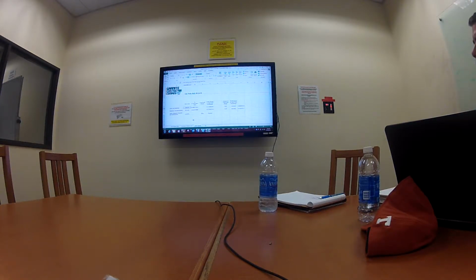So over there, that equals $319,000, right? 35% of the bare cost is $319,000. So then I took that $319,000 and I said, all right, I want to put 2/3 of that to my profit margin, and I want to put 2/3 of that to my labor and equipment, and 1/3 of that to my materials and subs. So I broke it out, and that's how I ended up.